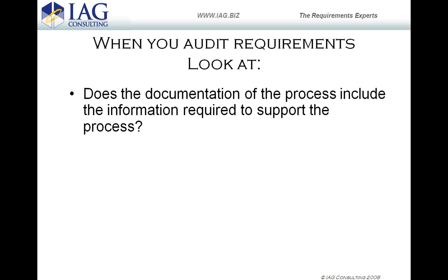What I'm talking about in predictive is, can you realistically predict that the project is likely to be successful or likely to fail as a result of looking at tangible characteristics of the project, okay? So in this case, if the documentation doesn't get down to really describing how information flows underneath the process, it's not sufficiently detailed enough to be able to guide and be true requirements for a project.